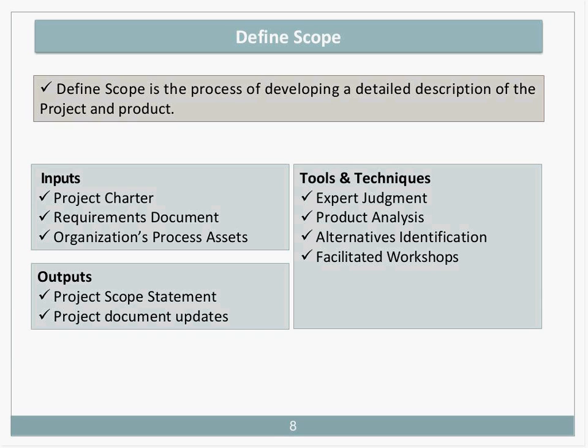In more detail, the description of the product scope, criteria, project deliverables, project exclusions, your constraints, and your assumptions. Documents that may require updating at this stage can include the stakeholder register. Of course, we might have identified more stakeholders or more needs for stakeholders. Requirements documentation or requirements traceability matrix: we might have found that there is a need that is fully supported by the functional requirement.